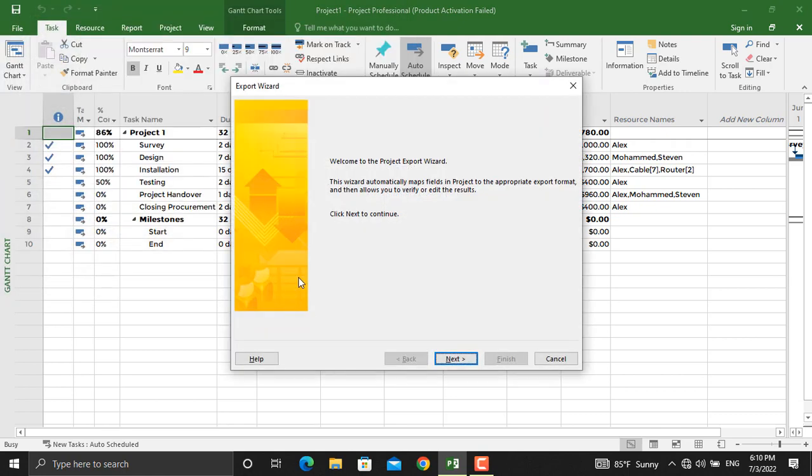As we did for importing a project schedule from Microsoft Excel to Microsoft Project, the same method should be followed from Microsoft Project to Microsoft Excel. You need to create a map and maybe save that map to use it later on for other schedules of yours.